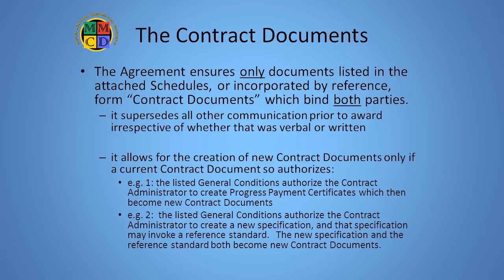Occasionally, I hear of owners who think that because they created the contract language, they have the right to pick and choose which portions apply to them during its term. This is not the case once the owner has set the terms and they have been accepted by the bidder to whom the contract was awarded. The contract is binding equally on both parties. No one party gets to choose which conditions will apply and which will be waived. If something is to be waived or modified or added, there has to be an agreement, at least on the method and the compensation involved.